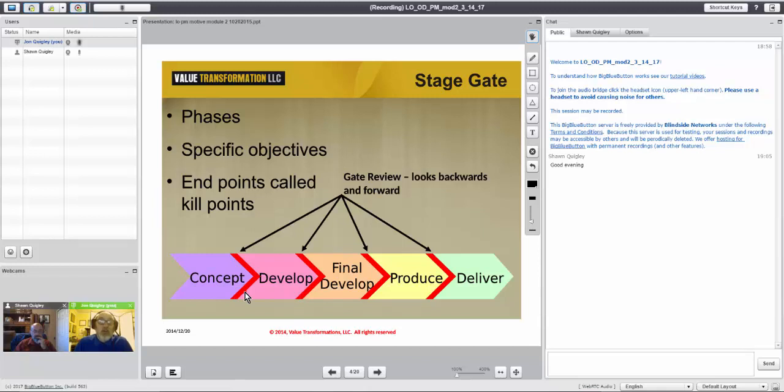These are called kill points, because if you don't hit those targets, what do you think may happen at that red bar? That would be the termination of the project at that point. Right. The concept says we can't sell it, we can't produce it, then we're done with this project, close it out, do something with what we learned in this leg. We'll talk about that in probably future slides and future modules, certainly. Do something you've learned about it, and then close this project down.